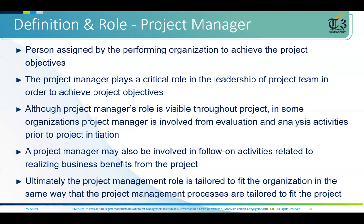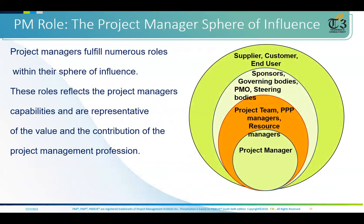Who are the stakeholders? Anyone who is being impacted or will be impacted by the project. The project manager will be handling the project team, public-private partnership managers, resource managers, sponsor, governing bodies, PMOs, setting bodies, suppliers, customers, and end users. Based on stakeholder engagement and communication, we develop a communication management plan — also called the sphere of influence or onion diagram — to define communication channels.